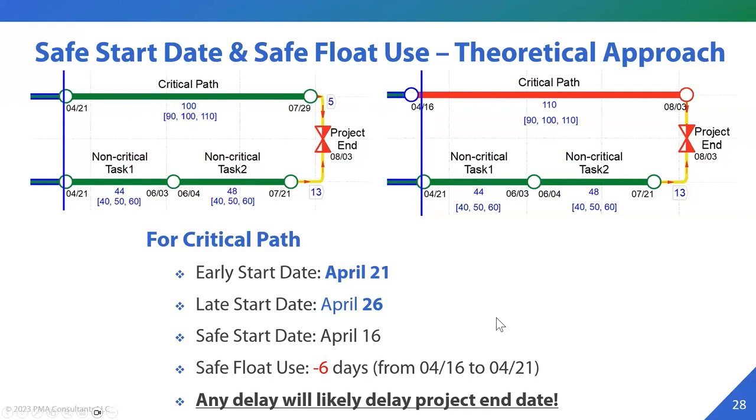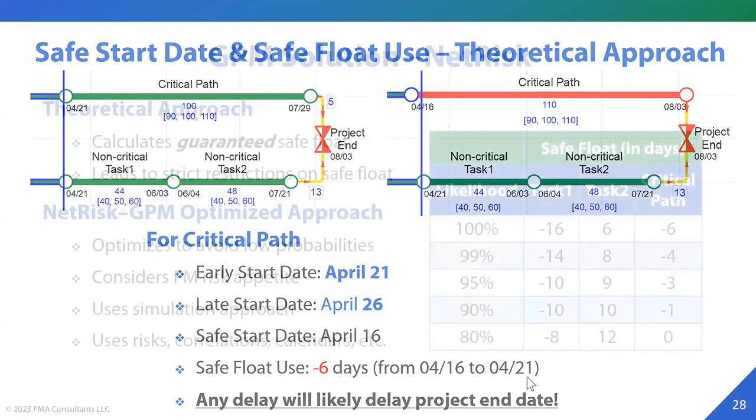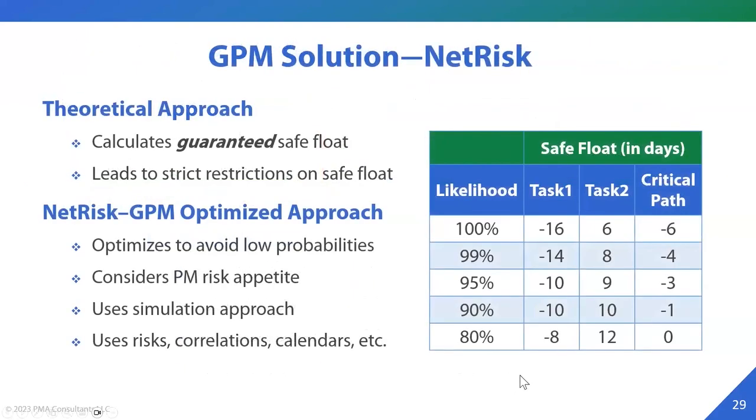And again, consider this, that we can do this approach of using the pessimistic durations, pushing everything on late start and building the worst possible scenario. Well, you can do that, but the problem with this theoretical approach is that it always gives you that guaranteed safe float. So guaranteed safe float being that, yeah, everything is the worst case possible, but how often does that happen either, right? That all the activities are always on their pessimistic durations.